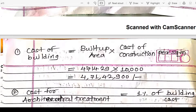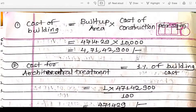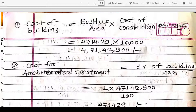The cost of construction is given as rupees 10,000 per square meter. So the cost of the building is the built-up area multiplied by 10,000: 4,714.29 × 10,000 = rupees 4,71,42,900. This is the base cost of the building.